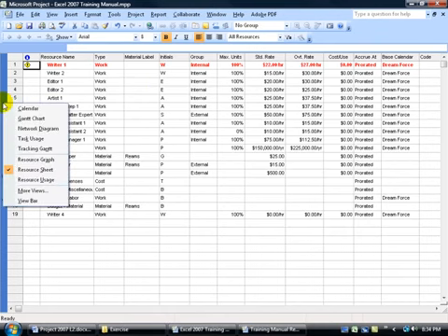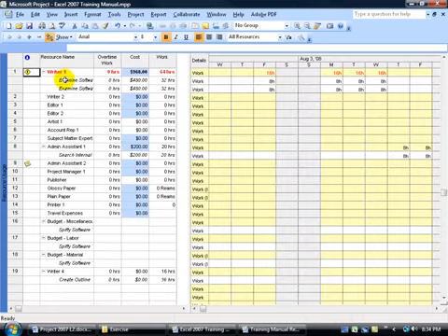or you can come over here and right-click on the collapsed view bar and go down to resource usage. Here, Writer 1 has a listing of the two tasks that he's working on in two separate projects. If you select the task and come up here and click on the Scroll to Task button, it'll take you over, and notice that he's over allocated. He's working 8 hours here on that day, 8 hours there. Remember, our default working days are 8 hours, so it's 16 hours. So the question I have is, which is which? Is this the Excel project or the Access project, and vice versa?